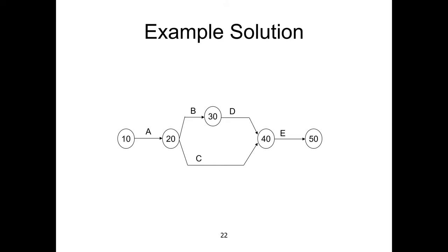Making the proper cover and these things. So we can split activities in more detail. That's why we put these nodes in gaps, in case we have to go back and split this part of the schedule into more detail. So these numbers 10, 20, 30, 40, 50 are just put there, but the main thing is that the activity is shown by the arrow. So we draw the arrow diagram.